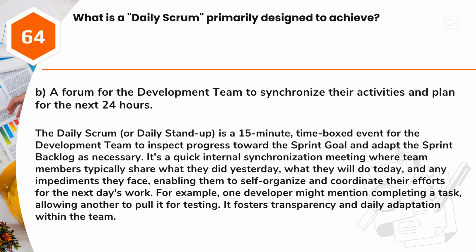It's a quick internal synchronization meeting where team members typically share what they did yesterday, what they will do today, and any impediments they face, enabling them to self-organize and coordinate their efforts for the next day's work. For example, one developer might mention completing a task, allowing another to pull it for testing. It fosters transparency and daily adaptation within the team.